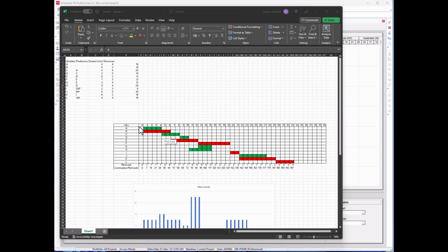Then we also want to load the program in P6 with resources. So what I've done here is to calculate the number of resources we need entirely for here. We can create a formula here, drag the formula down. So that means for here in total we need 16. If you see all these, 4 plus 4 plus 4, that's 16. So that's what we have here, and that's what I've populated here.